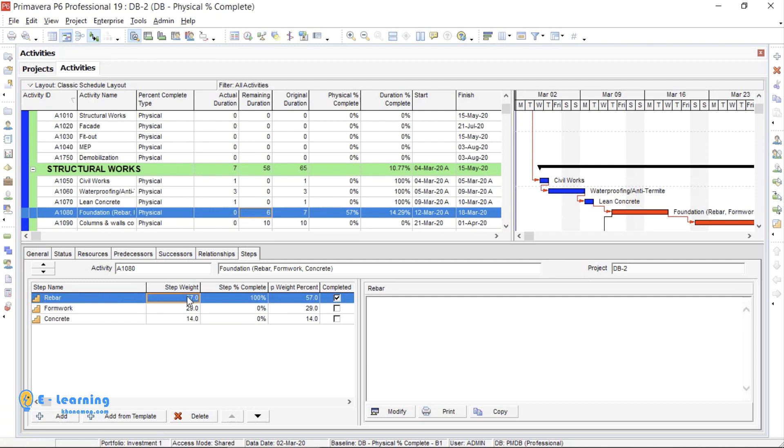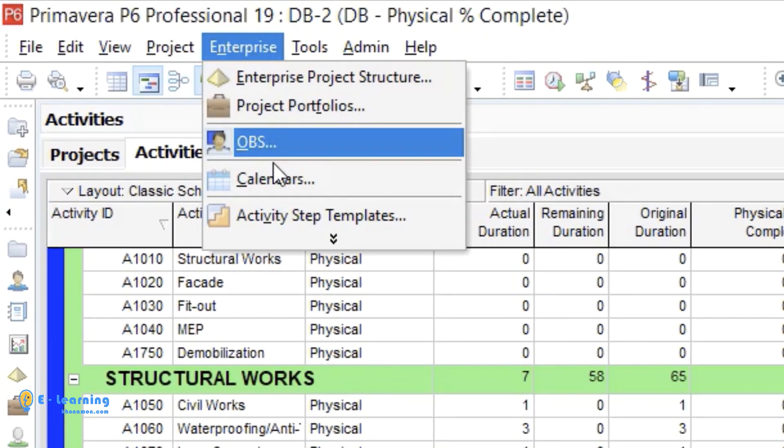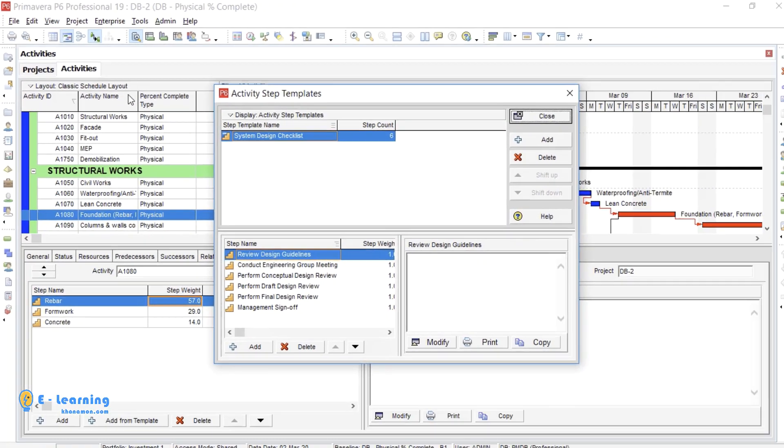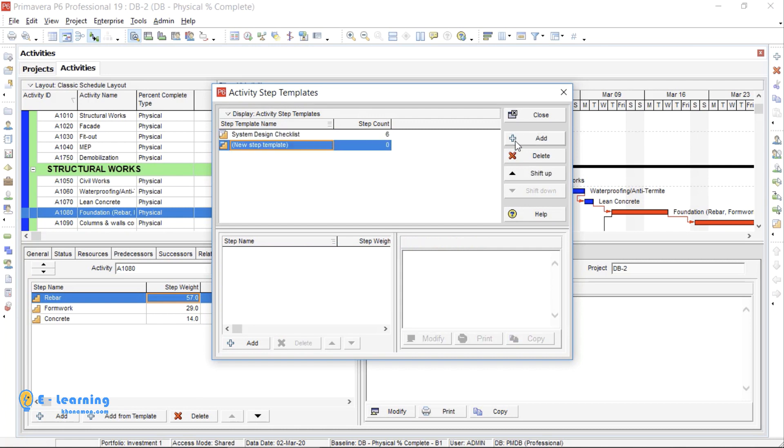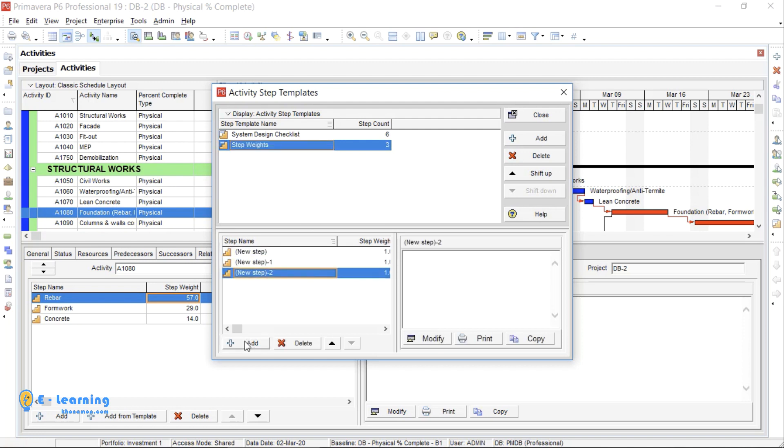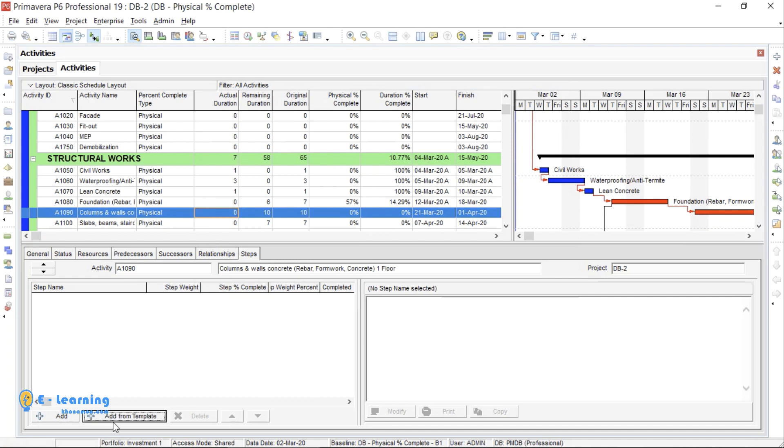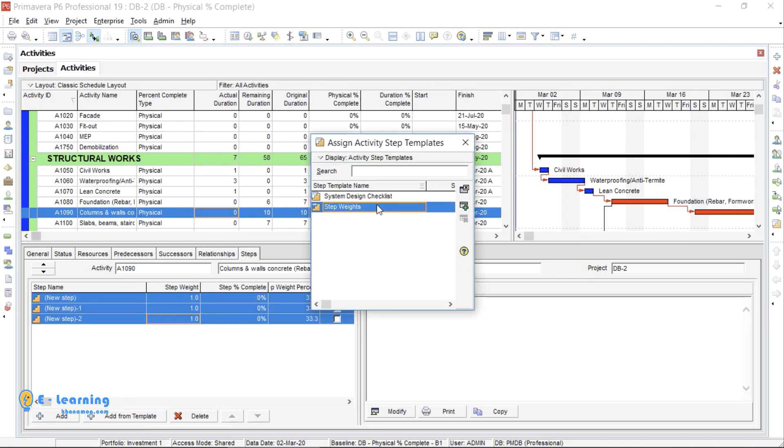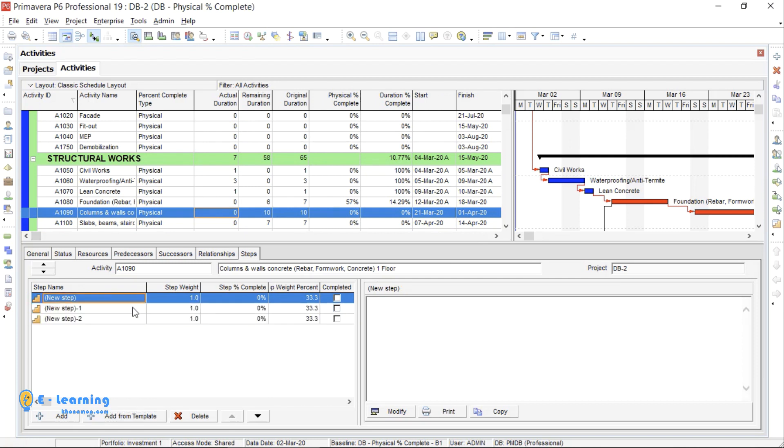Just take a note: for a series of works, you can use Template. Instead of inserting add every time, just once create and use it several times. For this purpose, go to Enterprise, and Activity Step Template. Add a template, give a name. I write the step weight. Then, from here, you can add steps. I select another activity, click on Add from Template, and choose the template which I've created. You see, these steps are added at once. Okay, Physical Percent Complete type is done.